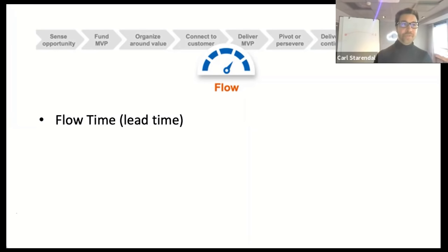And the first thing I would do as an RTE, or not the first thing, but one of the first things I would do is look for what flow times do we have for features in the ART. If I'm assigned an ART, if I'm starting to work with it, I would look at recent features, look at what's not only the average time or the most common time, I would look for median times, and I would also look for the distribution in the data set, because you might have outliers which might skew it.